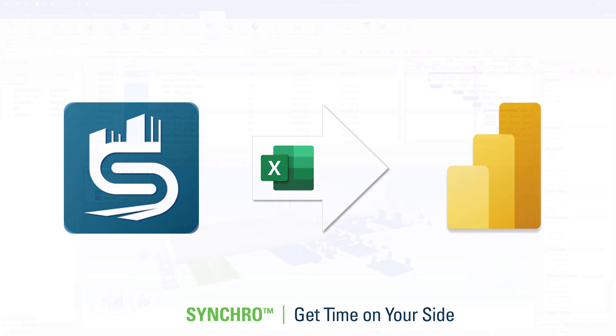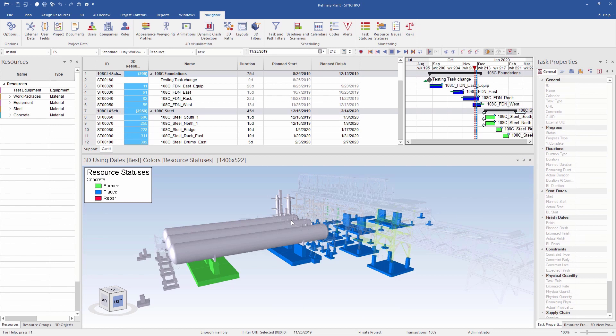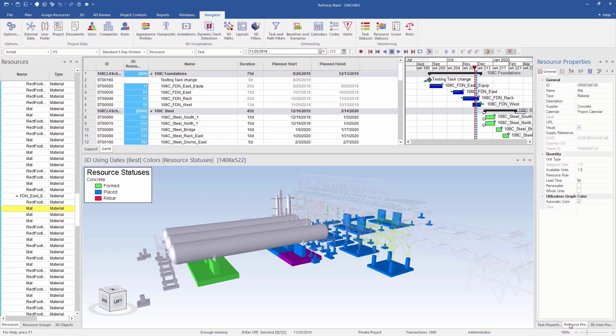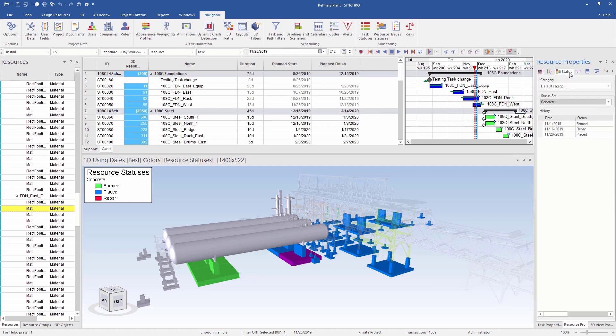I have a sample project set up here with a few resource statuses recorded for the concrete foundations. Using resource status color mode for the 3D view, we can see different statuses based on the focus time. I can actually select one of these elements, go to the resource properties, status tab, and see the timestamp history for the different statuses.